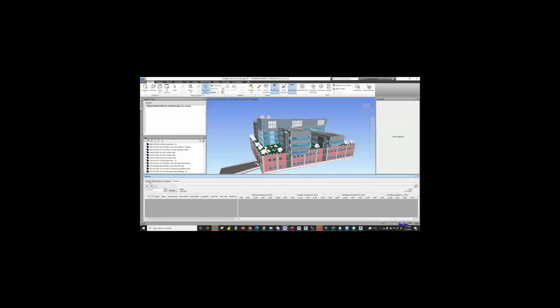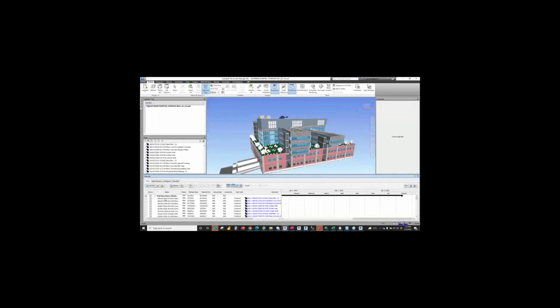And on tasks, the same syntax of text is showing up here. And there are auto attach rules that know to link up selection sets with the scheduled tasks of the same name.